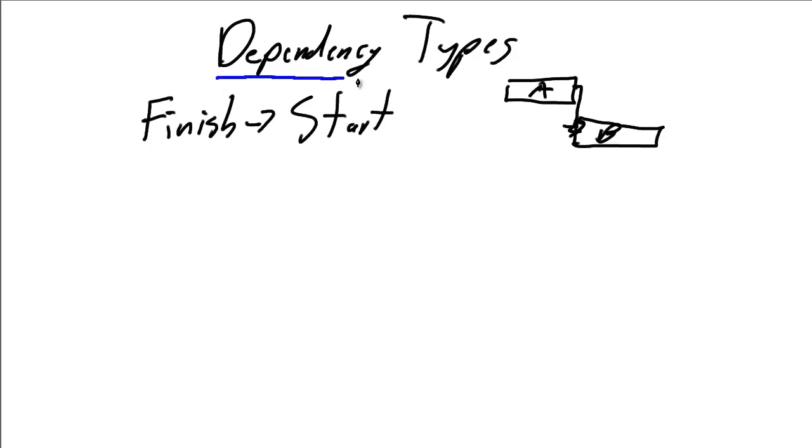But the good news is setting your project dependencies is relatively straightforward. There are four dependency types we need to be aware of, and the Finish-to-Start is the most common dependency type you're going to use in your project.